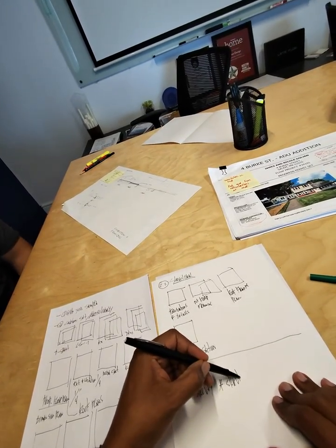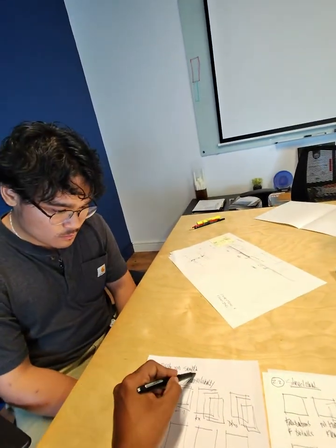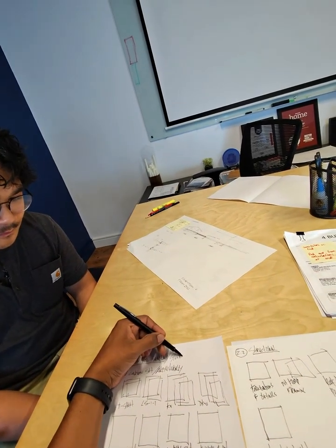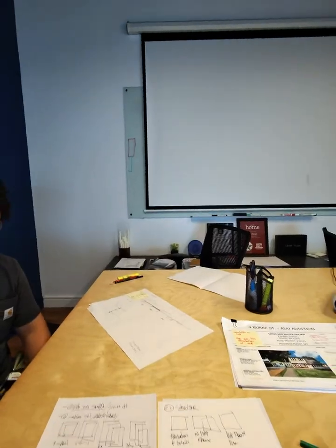The way that it goes is that the surveyor sends you the existing, and you should have that early on in the design process. But after you've already gotten an accepted design option that's been signed off, you send the surveyor immediately a PDF and CAD of what's proposed. And he's going to be able to grab that and put it into the proposed and tell you any setback issues too. He will be another line of defense when it comes to zoning and checking zoning.